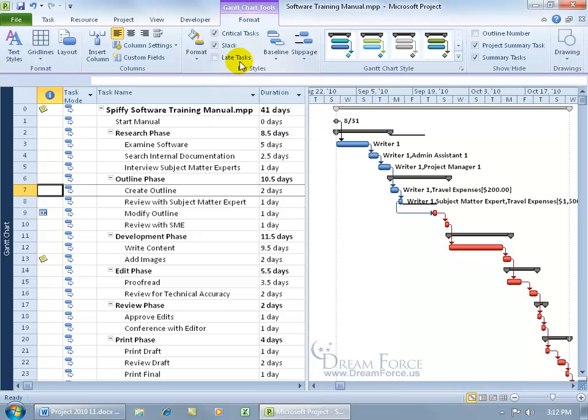Once you go ahead and check that, notice that if we have any slack time, it'll display it over here next to, well, any task like the project summary task in that line that you can see when you hover over it. And you see in that pop-up it says free slack until September the 21st. Oh, that's good. So all these tasks, we can go ahead and push out till the 21st. After that, if we go to the 22nd, then it's going to become critical. And you can see we've got one down here for this task. It says it's got free slack until the 24th, after which it's going to become critical.